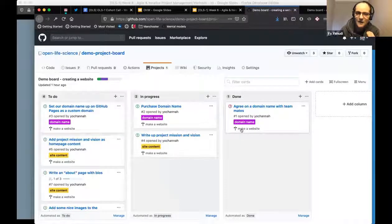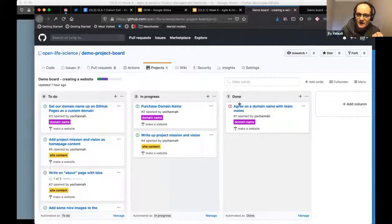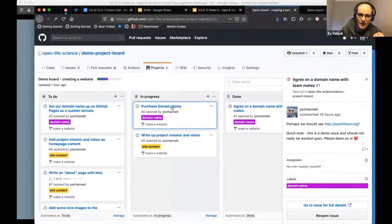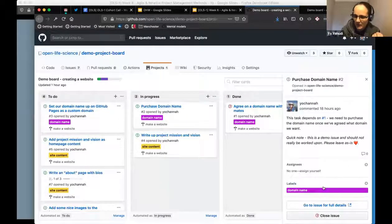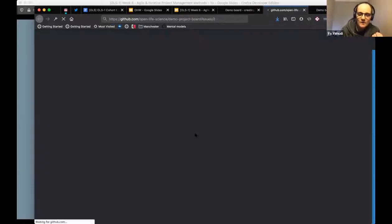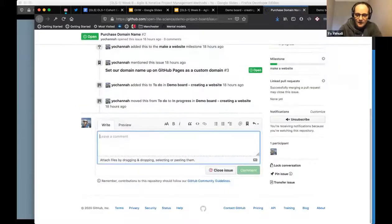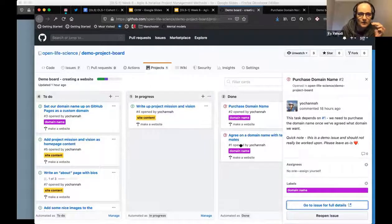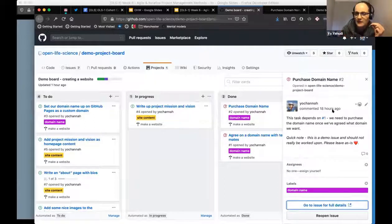I've set up a demo project board on GitHub. These are the same tasks shown in the slides. I closed the 'agree on a domain name' task earlier — we agreed to use openlifesci.org. Now I'll close the 'purchase domain name' task by adding a comment saying it was purchased and closing it. When I go back to the board, you can see it has automatically moved to the done column. It's a very effective and easy way to automate task workflows when your work is broken down cleanly.